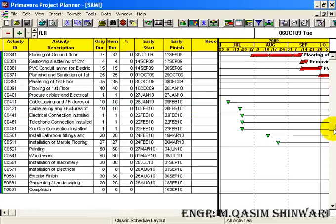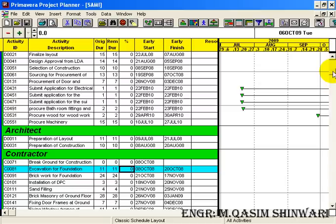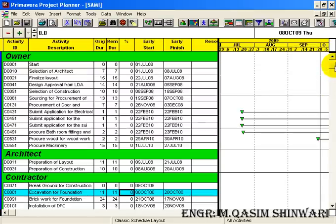It has also sorted the activities with respect to their initial or you can say early start date. So in this way you can do sorting and grouping.